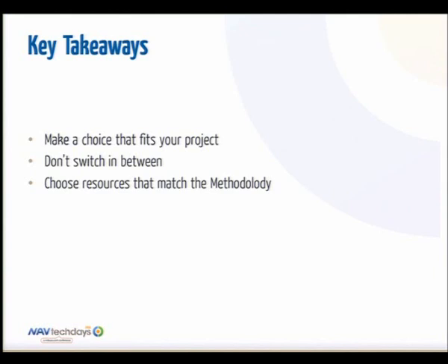Never switch methodologies in between. I mean, don't start speccing on waterfall and then start changing it. And use resources that match the methodology. Don't do agile development with junior developers, and don't have junior consultants write waterfall specs.